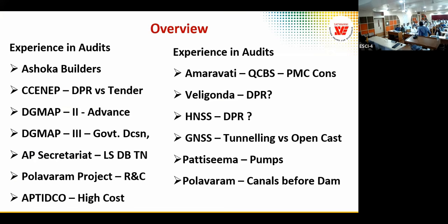From scratch. And the major challenge was the original contractor claimed all the material advance of 5,000 tons of steel. He dumped it there and went off. He took the money. And how do you collect that? It is spread in 19 locations. To collect that steel and bring it to the store, it cost us 30 lakhs, to evaluate the condition and quantity of the steel and all that. So that is a good case study.